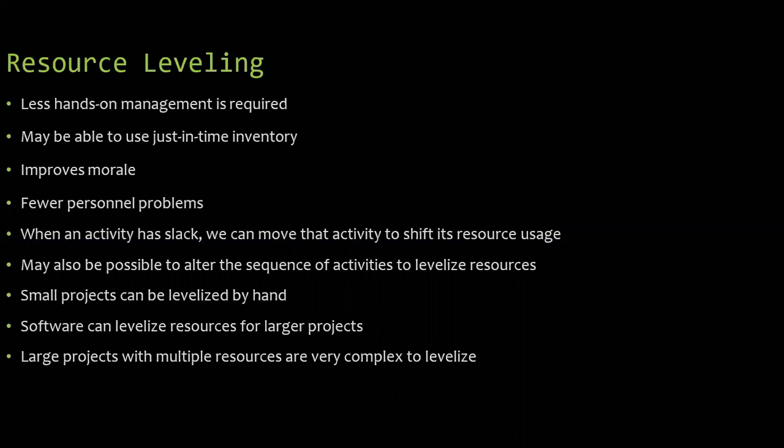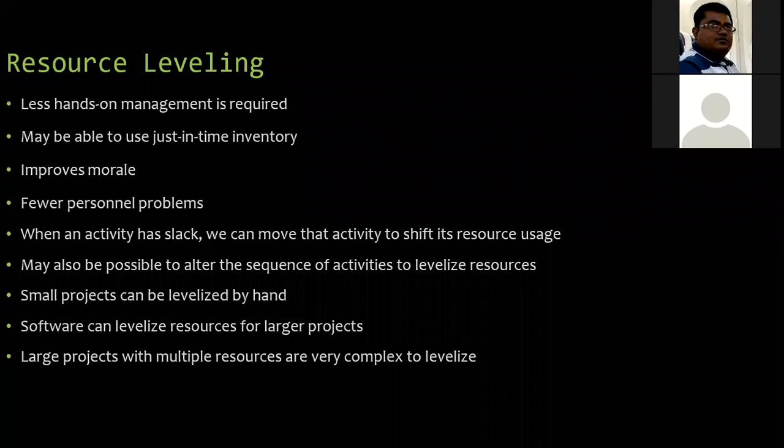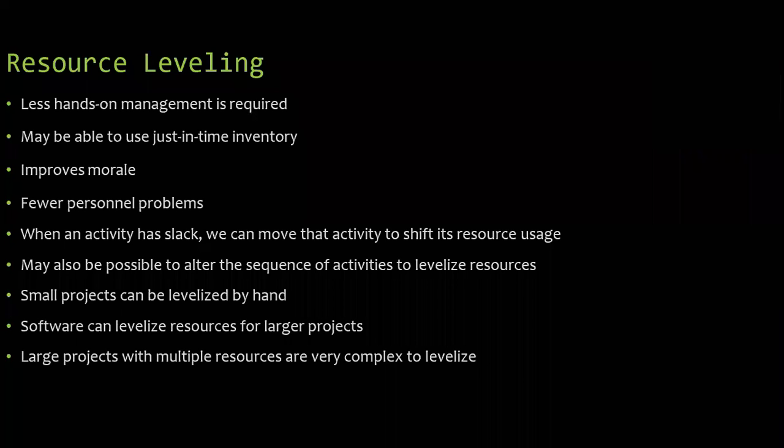Small project activities can be levelized with the help of pen and paper, that is, written by hand, or software can be used to levelize resources for large projects where many resources are there. There we can use different software. Large projects with multiple resources are very complex to levelize. For big projects you always find there is delay, because of such leveling and availability of resources. This is the particular point.